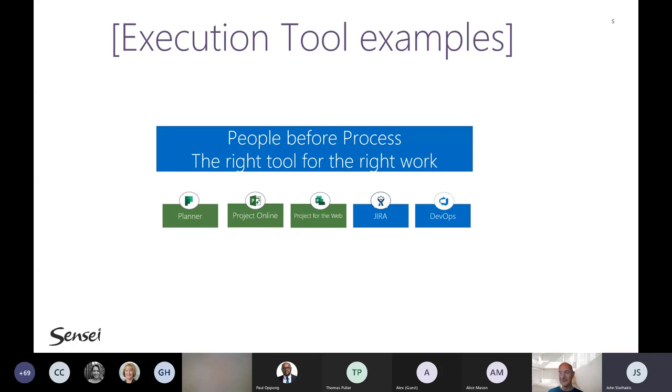So I would say the key for me is whether there's certainty required, and you have those external touch points that need to be brought in at different times to do different tasks, and there's a lot of dependency between them, then I think that would make a lot of the Scrum type arrangements a little bit more tricky to implement in the short term.